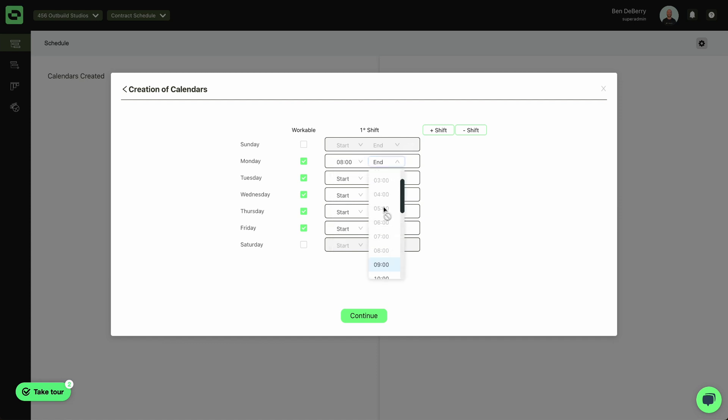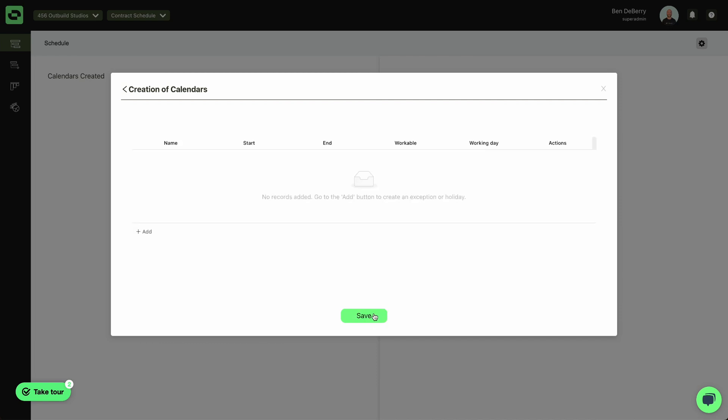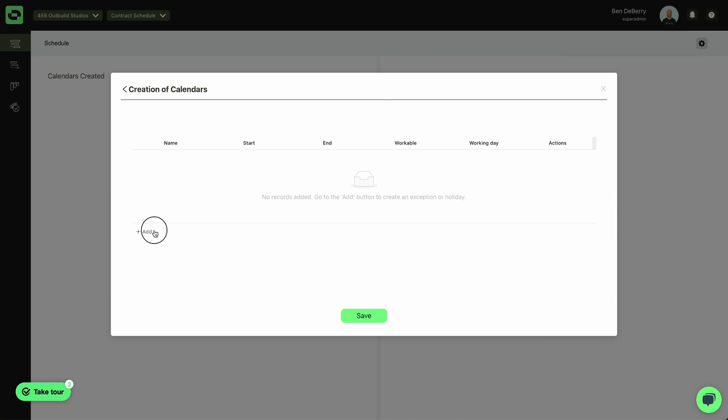In most cases, you'll want to set up an eight hour working day, apply that to all five of your days. Hit continue. I can even add an exception.